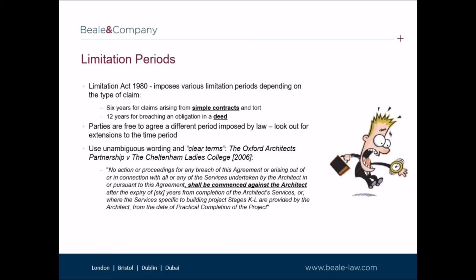So one of the lessons from this case is that it's important that limitation periods, whether statutory or contractual, be considered carefully. If a limitation clause is intended to reduce the statutory limitation period, it should state, we think, the cut-off date after which claims may not be brought, and expressly refer to the statute and the rights granted under it.